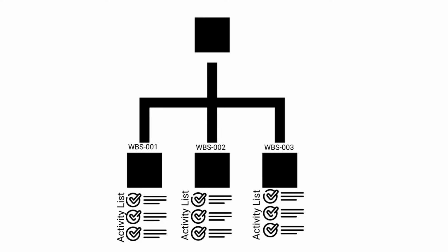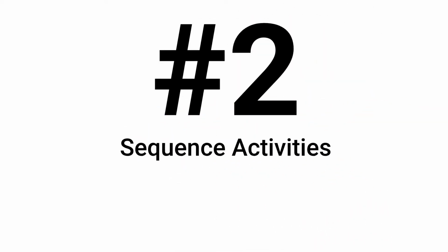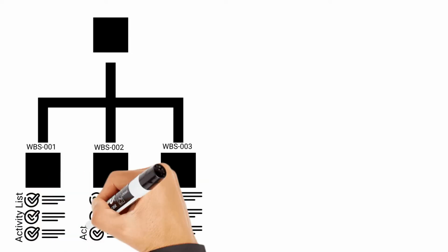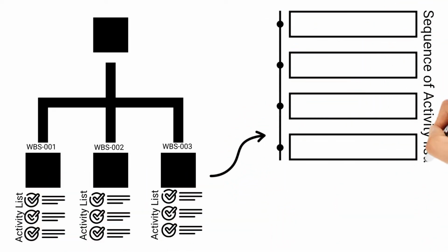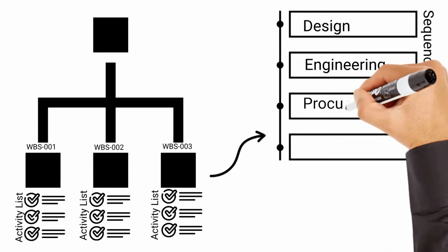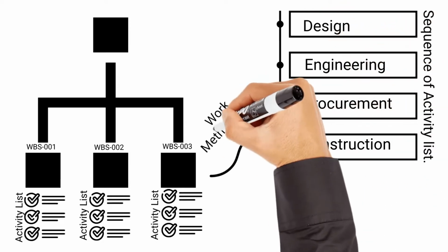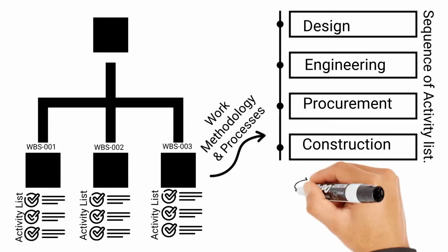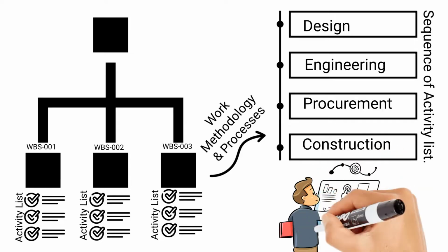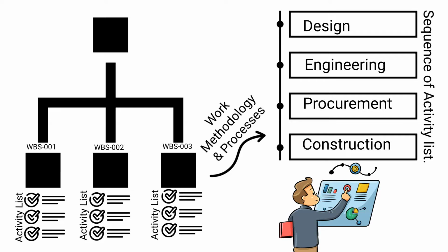Once you finalize the list of activities, the next thing is to sequence them. Sequencing of activities would be defined by how logically you can execute the work. This should be done based on input from all the functions, with consideration of respective functions' work methodology and processes. From day one, a project manager should manage the schedule expectations of all functional owners. Always build in a reasonable buffer for each activity. Project managers should explain why a schedule is not realistic, and provide a working sequence built on reliable projections for resource constraints and dependencies on deliverables.